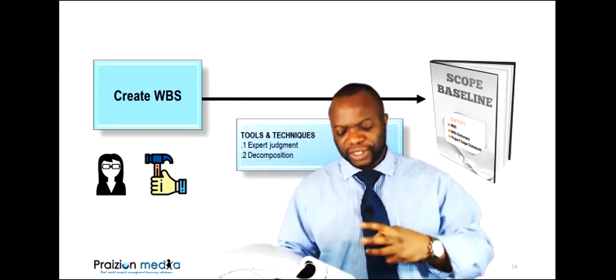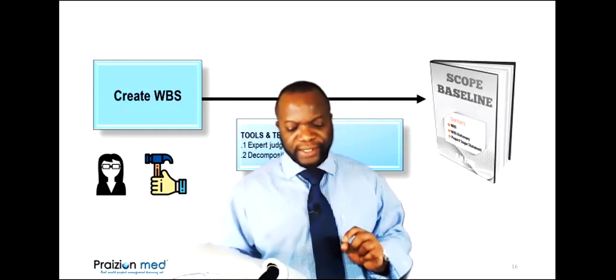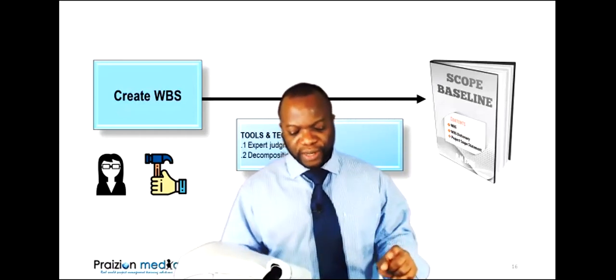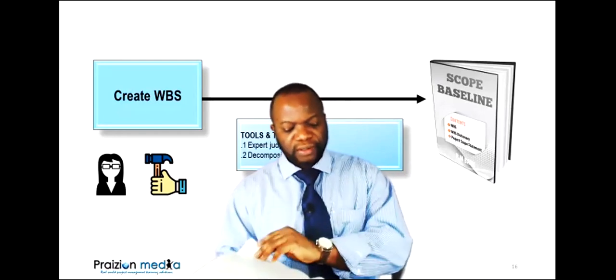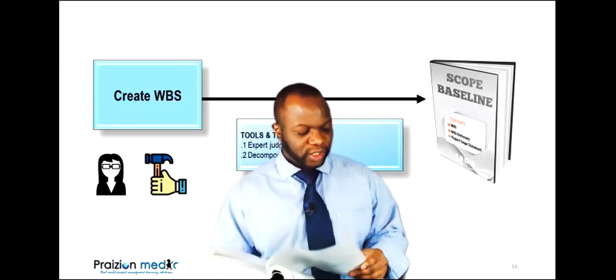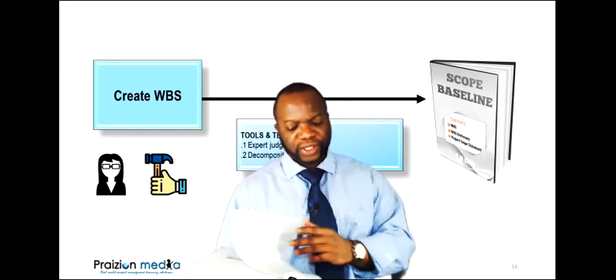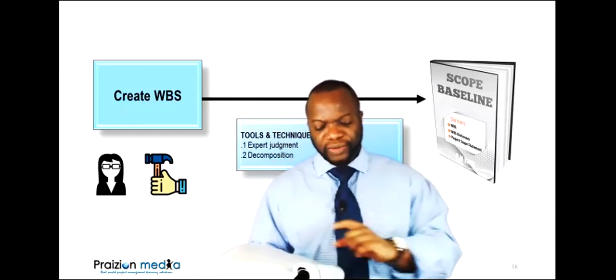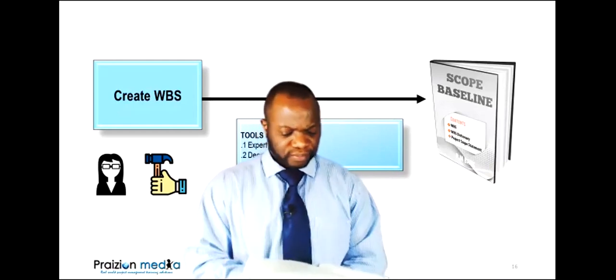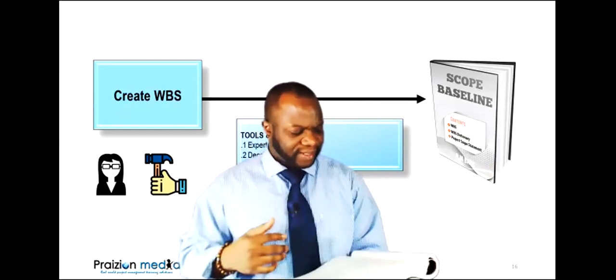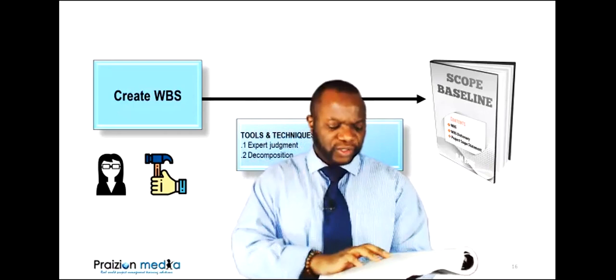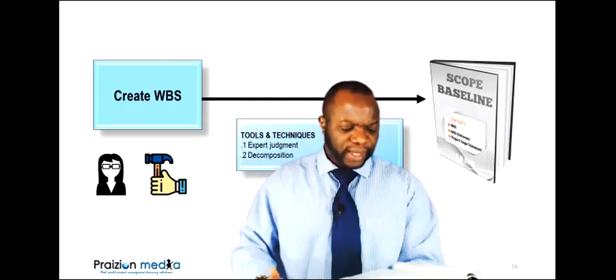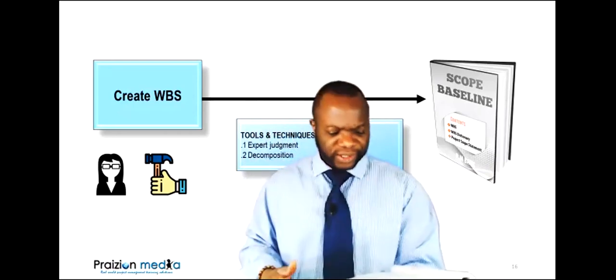Then it goes into the details of what is in the WBS. Project scope statement, WBS. Go to page 162, WBS dictionary. The work package is part of the WBS, so is the planning package. So mentioning them as components of the scope baseline is like double counting what should be in the WBS, if you get what I mean.